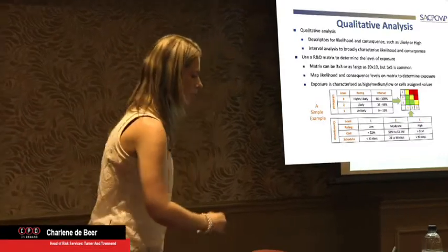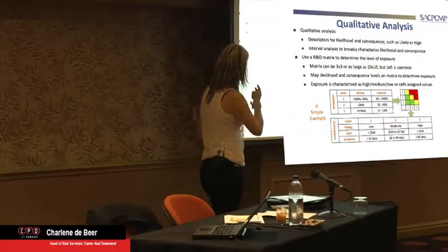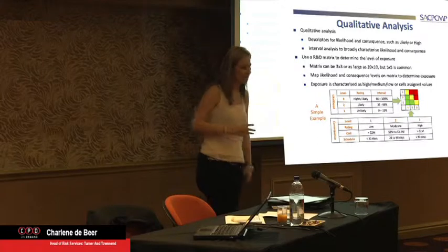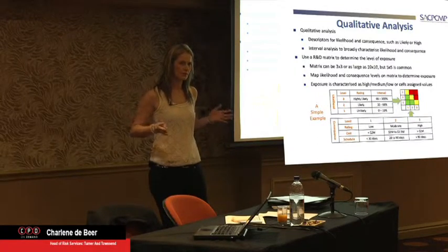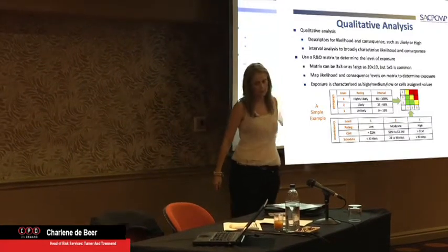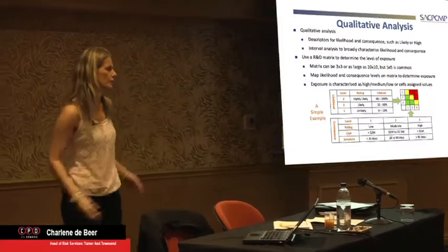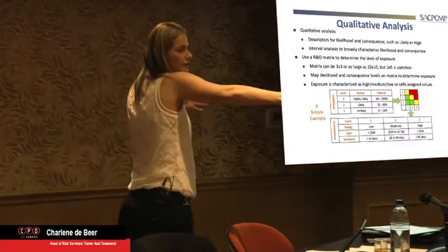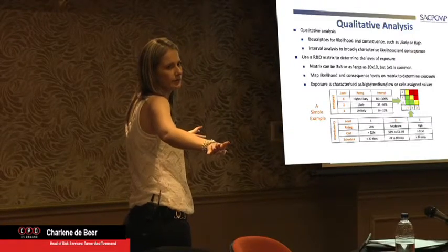So sometimes we need to assign a percentage to it. We'll say if it's a high likelihood of it happening, it means it's between 66 and 100% chance of happening. Now on a 3x3, that is quite drastic, 66 to 100. So I'd rather break it down into a 5 or a 7 risk matrix so your percentages are much closer to each other. And please, never give the guys a 50-50 option.